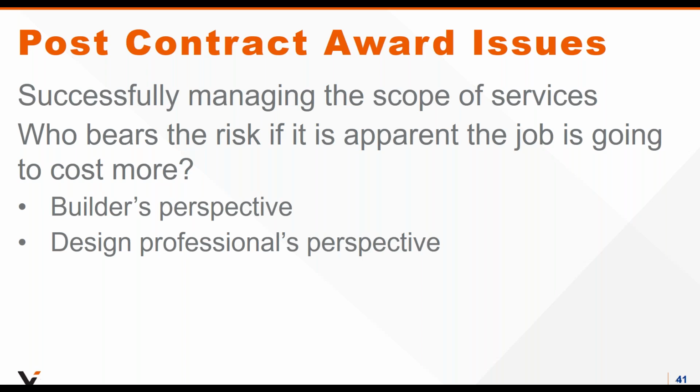So hopefully you have a builder who has the right contract in place that allows them to have a cost escalation clause with the owner that allows them to go back and say, hey, owner, the situation has changed. Therefore, you're getting the benefit of this facility. We need to negotiate an uptake because it is just not commercially reasonable for us to continue.